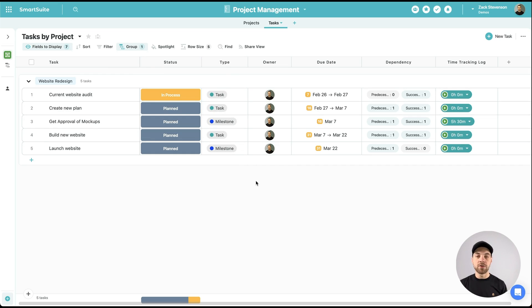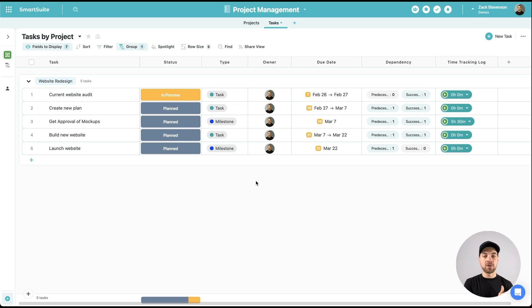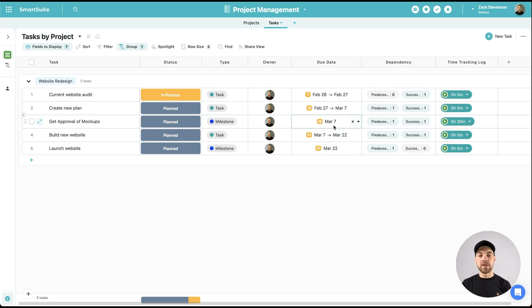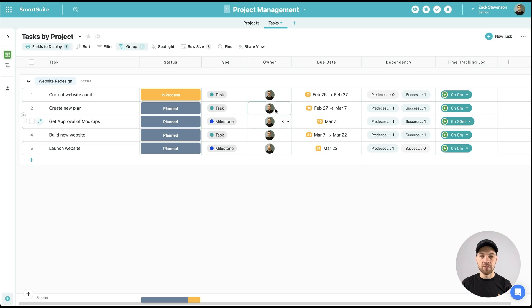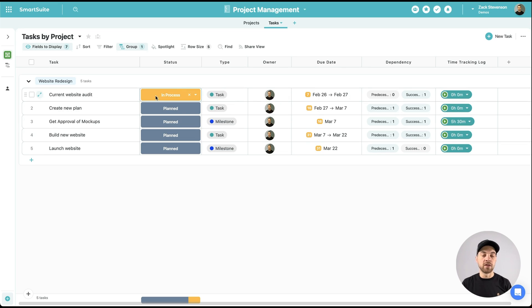I've got a couple of different types here. I have a task and a milestone. A task usually takes place from a start to an end date. A milestone, like a checkpoint that we're looking at, needs to only have one date associated to it. And I will show you why once we build out the Gantt chart. I've assigned an owner to these tasks. It's only me for the time being. And then we've got due date. So this is where we can add our start and end date per task.